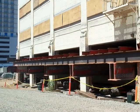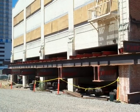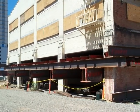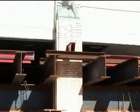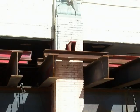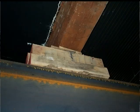Following the cross steel beams, Emmert began installation of 48 needle beams, each a W10 by 7.5 foot long, and jack tubes and other smaller support beams in the columns and in the open areas around the perimeter of the structure. The jack tubes were particularly important as they would allow for individual adjustment of the support at each column around the perimeter of the building when the building was loaded. On top of the cross steel, jack tubes, and other small steel, Emmert placed oak cribbing, oak wedges, and shimming to make full contact between the support structure and the building.